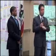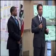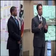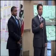Now, back to what Todd said, there are going to be effects, there's no question, and so our specifications are meant to handle that. What we do is provide maximum decibels they're allowed to have, and we work with the hours that we can. So I can't promise you there won't be any noise for 2 years, but what I can tell you is we've definitely done what we can to mitigate it, and it's not going to be 2 years of a guy with a jackhammer outside your front door.